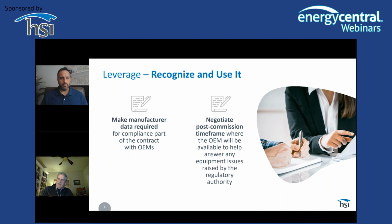I would recommend having at least a 30-day continuation after the commercial operations date when you receive the commissioning reports for all of your equipment. Okay, plus I want you to be available for 30, 60 days after that. If something comes up, I want to be able to call you. And this is from direct experience that we've had with folks. Okay, next slide.